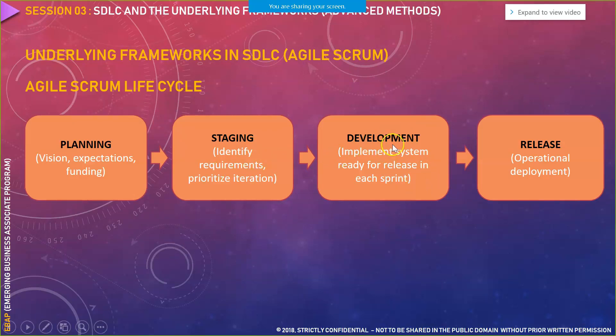The development phase is where you implement system features ready for release in each sprint. After every sprint you get a better version of the system with more features compared to the earlier sprint cycle. Finally, the release phase is where all your code is deployed to various environments. In agile we also have different environments: local development environment, QA environment, SIT (system integration testing) environment, UAT (user acceptance testing) environment, and production environment.